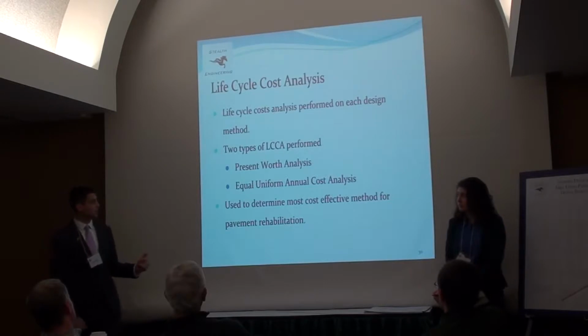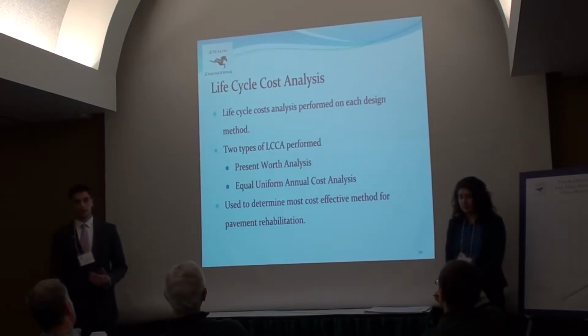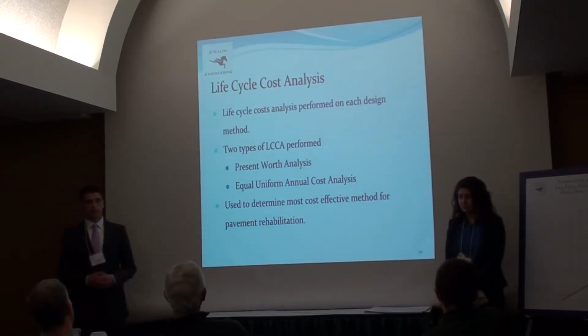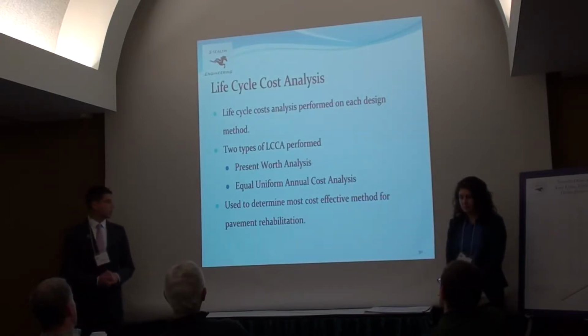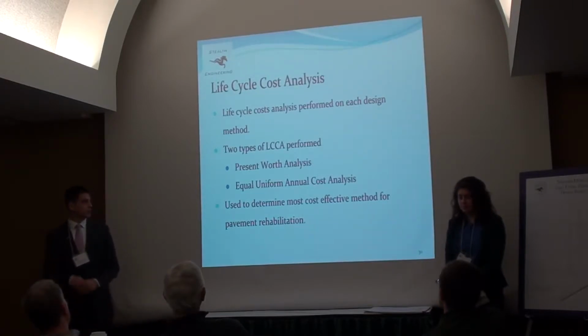The next was an equal uniform annual cost analysis. This analysis takes all the costs over the lifetime of the pavement and puts it into uniform annual costs, so you can determine the most economically effective one. And these analyses were used to determine the most cost-effective method for pavement rehabilitation.